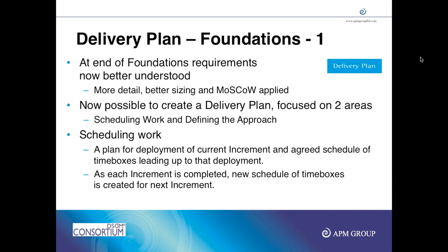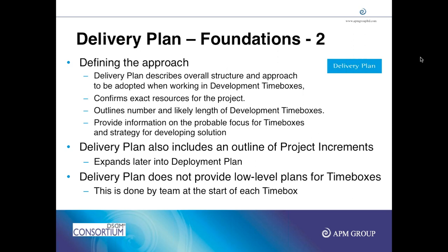But this is fluid, this is flexible. It is possible we might change what we exactly do during that period. That's a delivery plan, a pretty high level plan which shows how many increments and how many time boxes, the size of time boxes, and placeholder requirements to be done during that time box. It shows you the overall structure and approach for time boxes. The size of time boxes is also fixed.